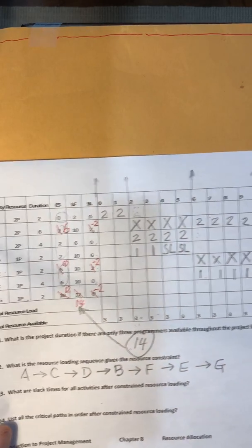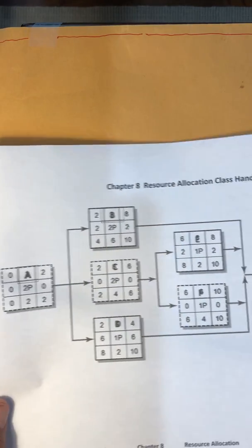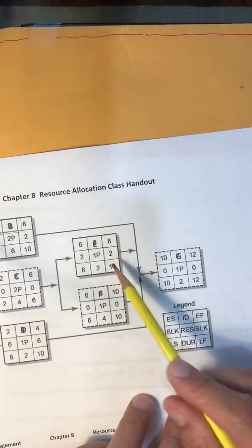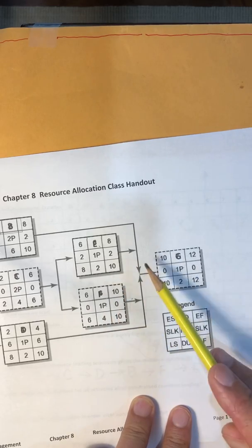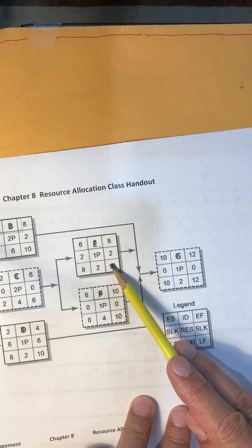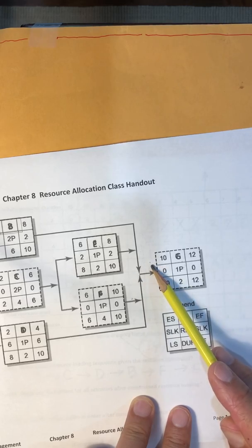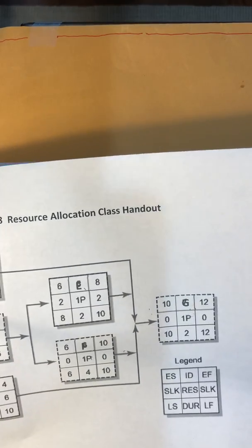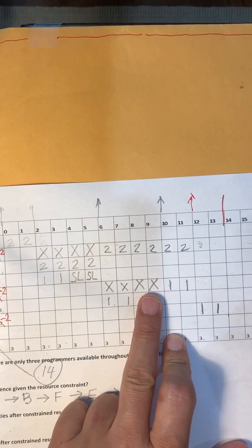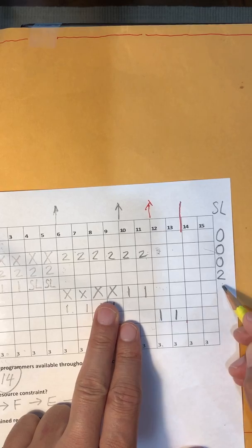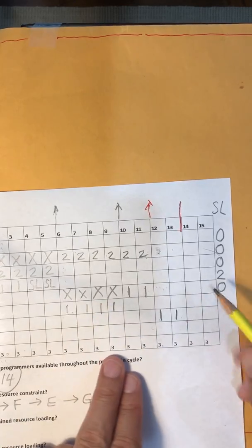E and G. Check the network diagram. B, E, F, all the 3 activities are predecessors of G. E is not allowed to be concurrently scheduled with G. So when we delay E, we have to delay G. Therefore, E does not have slack time.